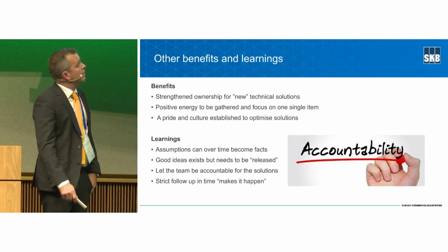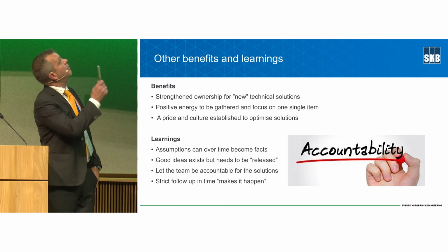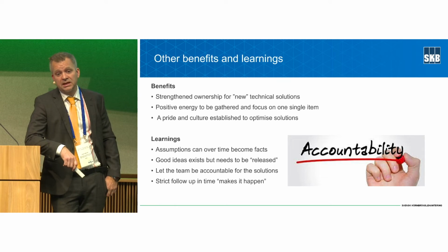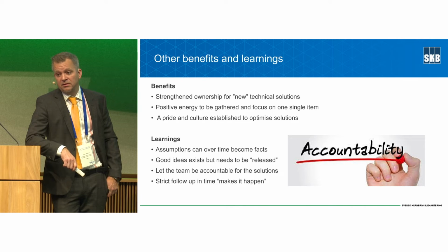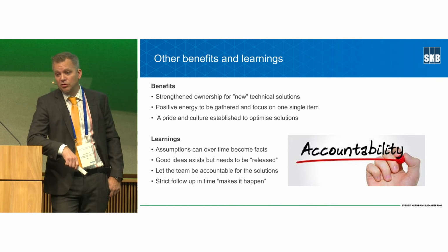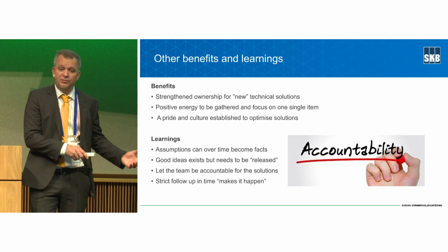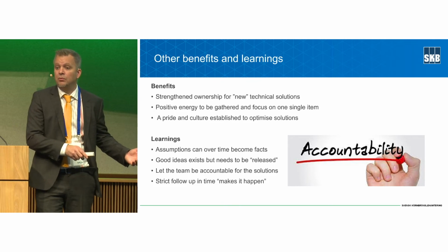Some learnings: assumptions that you make early in the process can easily become facts later on in the process. We have experienced that quite a lot. Things that we thought that we couldn't challenge because they were really requirements, but then when you look back, it's just an assumption somewhere in time.